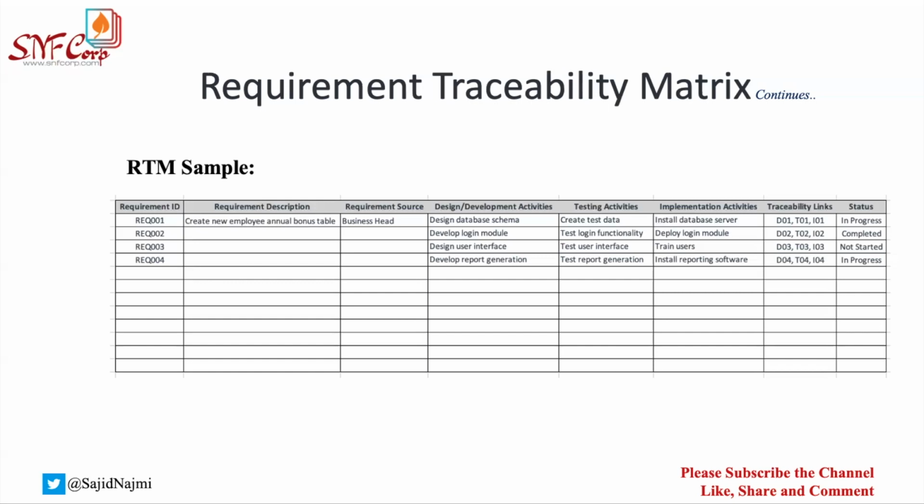And I'm also writing, okay, this change will also impact the testing activities. So we will have to create test data. I'm writing here, this will have an impact on the implementation activities. We have to install this change to the new server. Obviously, if I'm making any changes, I will have to do testing. I'll have to deliver things. When I'm delivering in the IT world, we do deployments, installation to the server. So that is also an impact.